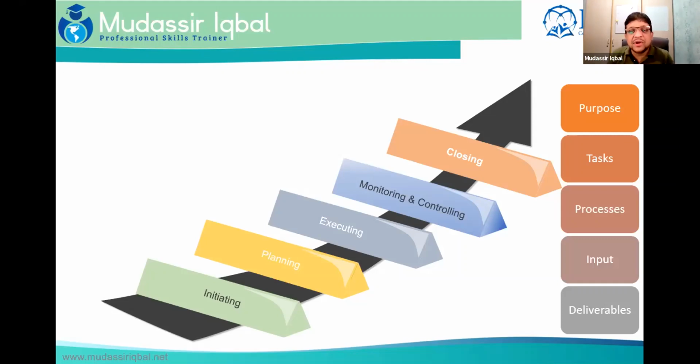Planning is of major importance to a project, because a project involves doing something which has not been done before. So you need to plan how we are going to do it. We saw yesterday there are some core processes which have clear dependencies that require them to be performed in essentially the same order on most projects. Those are processes like identification of the scope, creation of the work breakdown structure, identifying activities, and creating the schedule. You cannot create a work breakdown structure without identification of the requirements. You cannot do the scheduling before identification of the activities, the resources, and the duration. The schedule cannot come out. So these are the core processes.